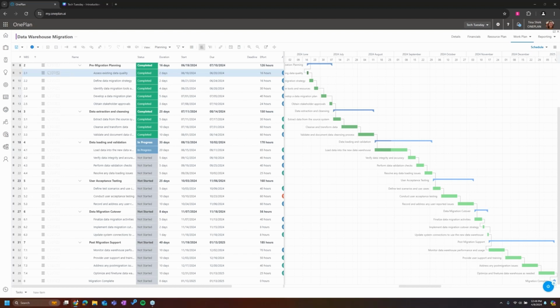So there are a couple different ways, and the most common way, and you'll see that here, all of these are going to be finish to start successors. So what that means is that your successor task or the second task cannot start until the task before it has completed. So you can see how this is shaking out here in this schedule, where you have this nice waterfall where the line goes from the end of one task to the front of the next, and so on. So that is the out-of-the-box finish to start.